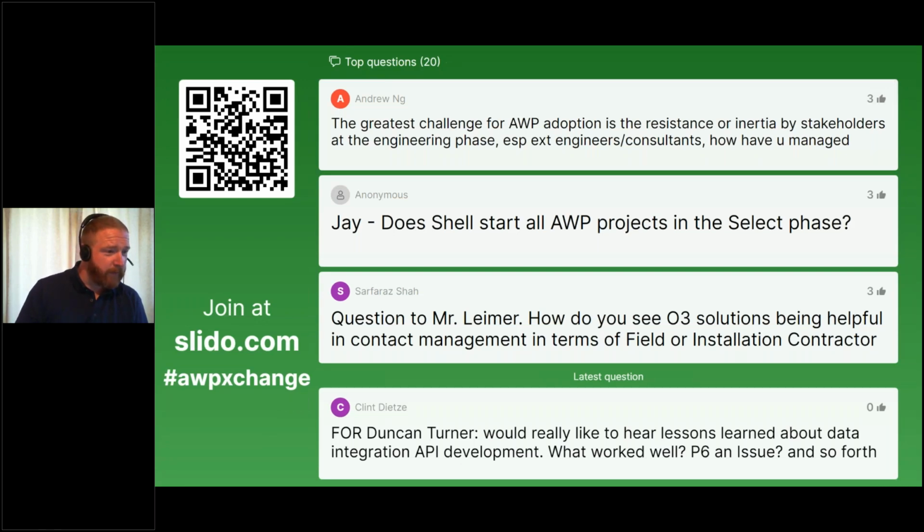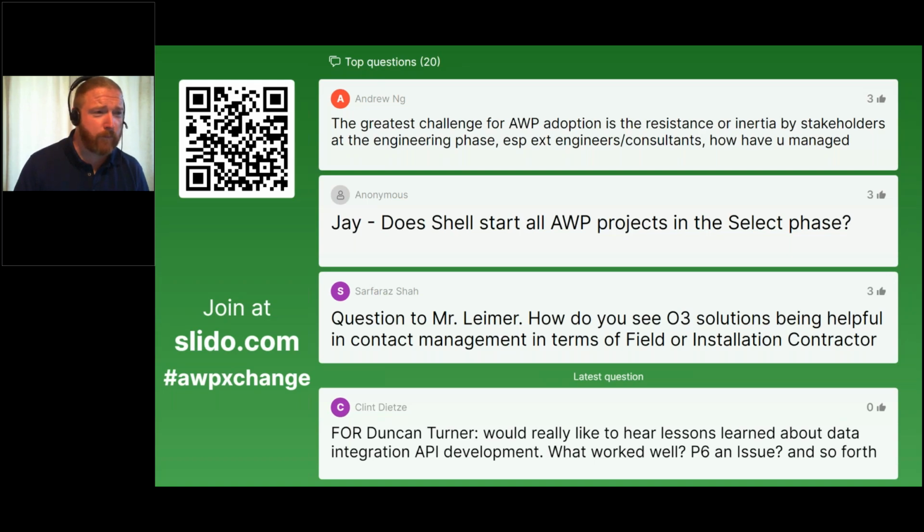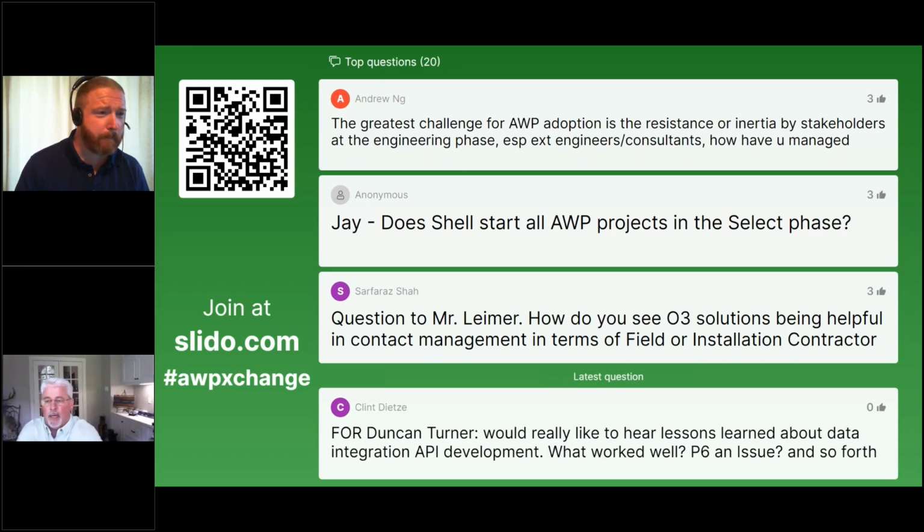Okay. Jay, I'm going to start with you because I see one right there in the middle with your name on it. So does Shell start all AWP projects in the select phase? Okay, Andrew. No, not necessarily. Again, the smaller portfolio jobs that we may be implementing in the assets might not get to the level of pre-feed or select phase AWP work. So no, not in every case, but I would say that the norm for any larger project would be yes.